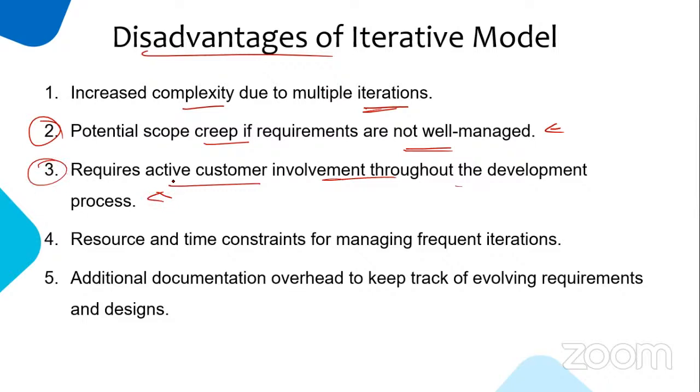Actually, very frankly, in a real-time project, we will face difficulty finding the customer's appointment. If you have some queries, it's not like you go and ping, hey, I have a query like this, could you please resolve? It is not possible. The on-site team's timing will be different. We have to ping and ask, is it the right time? Then I want to schedule a meeting. Is that okay? Then before going to the meeting, we have to consolidate all the queries. So the dependency on the customer is very high.